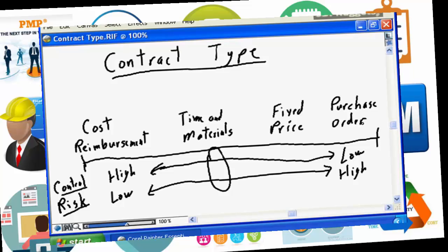It's very important that you as a project manager are aware of the type of contract that's being negotiated for your project, and that you don't get caught up in, if I can use the term, the smoke and mirrors as part of the sales process, where you have a vendor salesperson trying to invent a new style of contract that's going to most likely benefit the seller's company more so than your company. So it's very important that you understand the type of contract, the degree of control you're going to have over the process, and the degree of risk that you're accepting on behalf of your project based on the style of contract, and that it is appropriate for your contract, and that you're positioning yourself somewhere on this continuum of high-low control and risk levels that satisfies your specific project requirements.